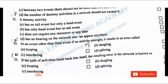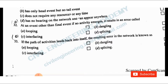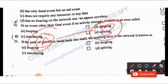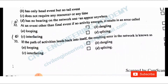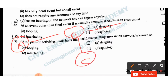At any event other than the final event, if no activity emerges, it results in an error called dangling. If the path of an activity leads back into itself, the error in the network is known as looping. So looping is when the path cycles back, and dangling is when an activity does not connect to the final event.